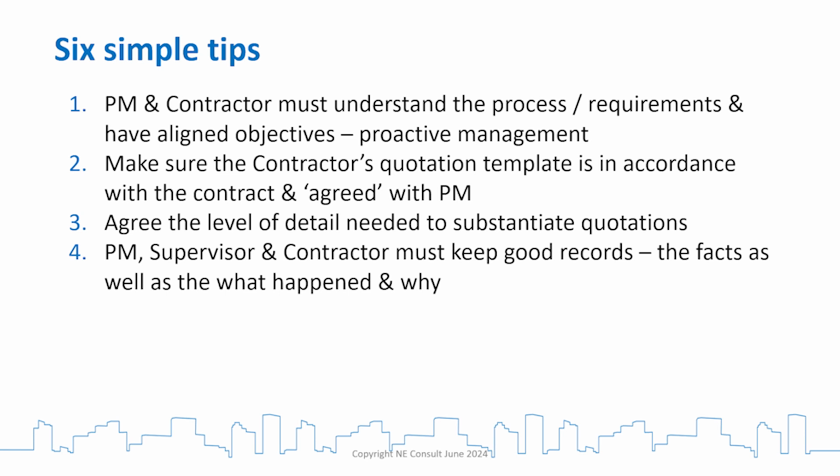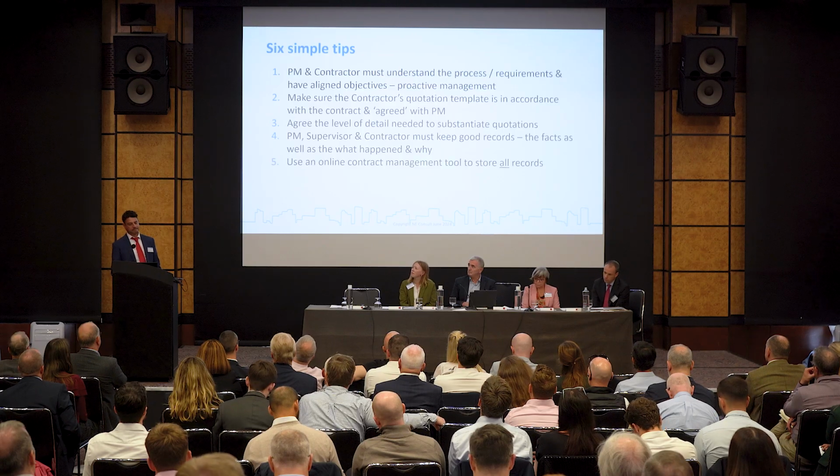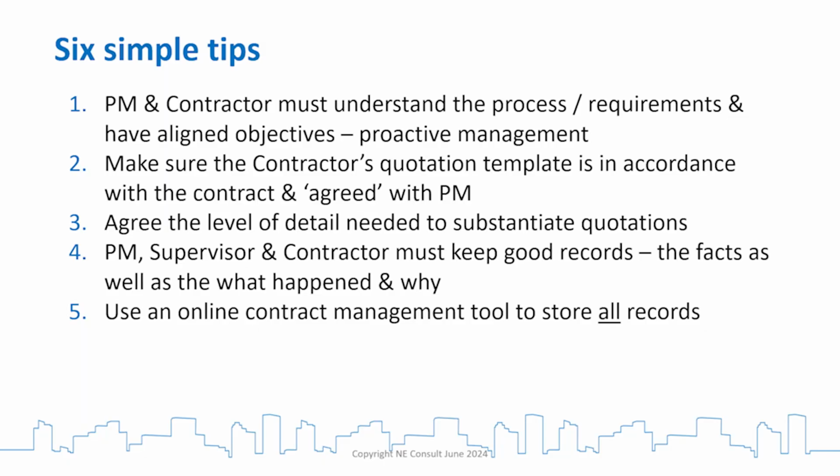Keep good records, the facts, as well as what happened and why. Okay? Use an online contract management tool to store all the records in. And when I say all the records, I mean all the records, not just the NEC records.